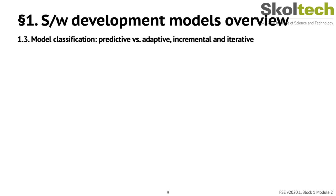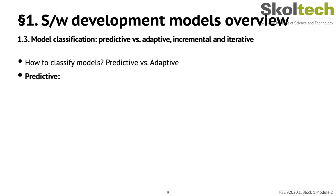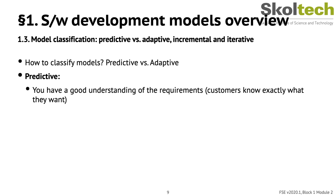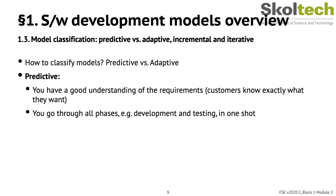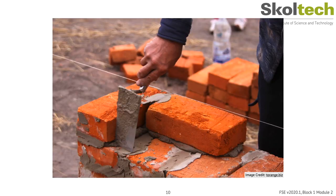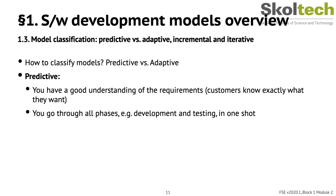One way of classifying models is viewing them as either predictive or adaptive. In a predictive development model, you predict in advance what needs to be done and then go out and do it. You need a good understanding of requirements, supposing customers know exactly what they want. You go through all phases — development, testing, and deployment — in one shot. As an analogy, you build a brick wall based on past experience: you know exactly how long it takes and how many bricks you need.